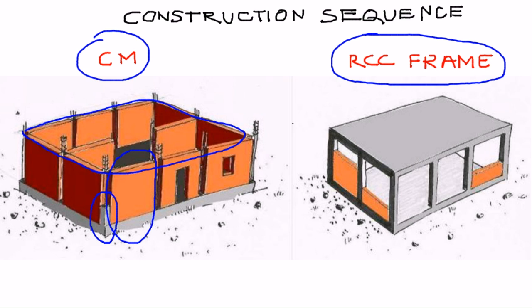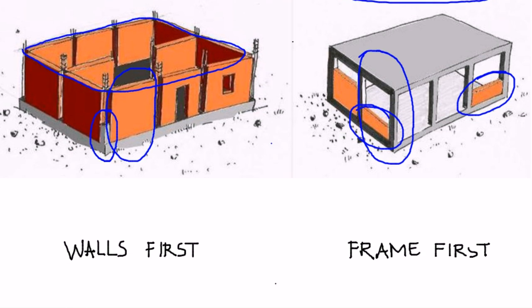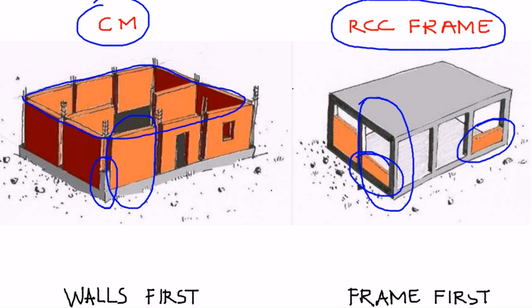On the other hand, for reinforced concrete frame construction, frames along with floors and roofs are being built first for the entire building. And masonry infill walls are being constructed at the very end, as it can be seen here. So that is a major difference in the construction sequence and it has implications on the differences in behavior of these two technologies. To summarize, confined masonry construction can be defined as walls first construction, whereas reinforced concrete frame construction with masonry infills could be described as frames first construction.